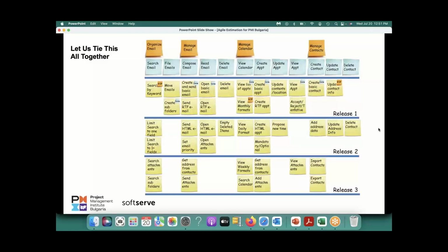If the team commits to a sprint scope goal, but during the sprint it becomes obvious that the work will be completed in half of the estimated time, should we pull another user story or close the sprint earlier? Okay, so one fundamental thing: the sprint is a time box. It doesn't expand or contract. Two weeks means two weeks. If it starts on Monday morning, it finishes on the following Friday evening. That's it. Now, you may have a situation where you may not be able to complete the things. If you could not complete, you could not complete. You don't extend it by another day or two. And in the other situation, what you're talking about, you could do more. You finished in half the time.